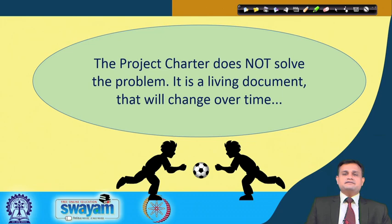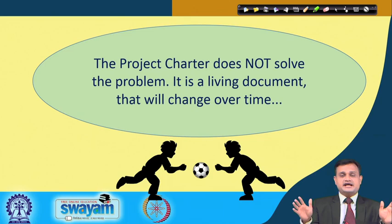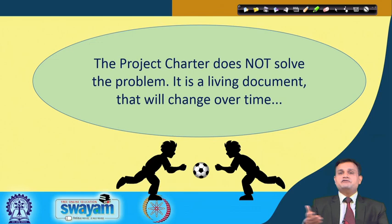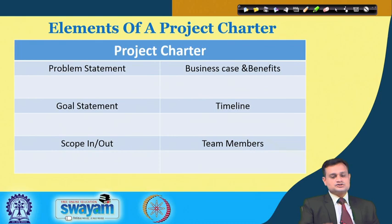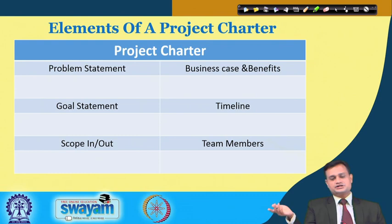A caution: many times you become extremely rigid with the project charter. Remember, the project charter is a dynamic document — not to be changed for convenience or internal benefits, but dynamic. As the project advances, we may have to include new people or shift deadlines, and we should adapt the process of evolving the project charter in a quite dynamic manner. The elements of a project charter include problem statement, goal statement, scope in and out, business case, benefits, timeline, and team members. We will see more sophisticated frameworks and templates.